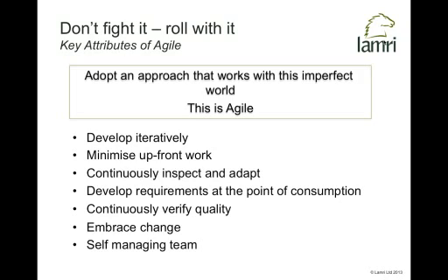Continuously verify quality. So it's about test. Every iteration, you test what you've done in that iteration. And what's more, you regression test. So rerun the tests from the previous iterations, so we make sure that we haven't broken anything that we did previously.